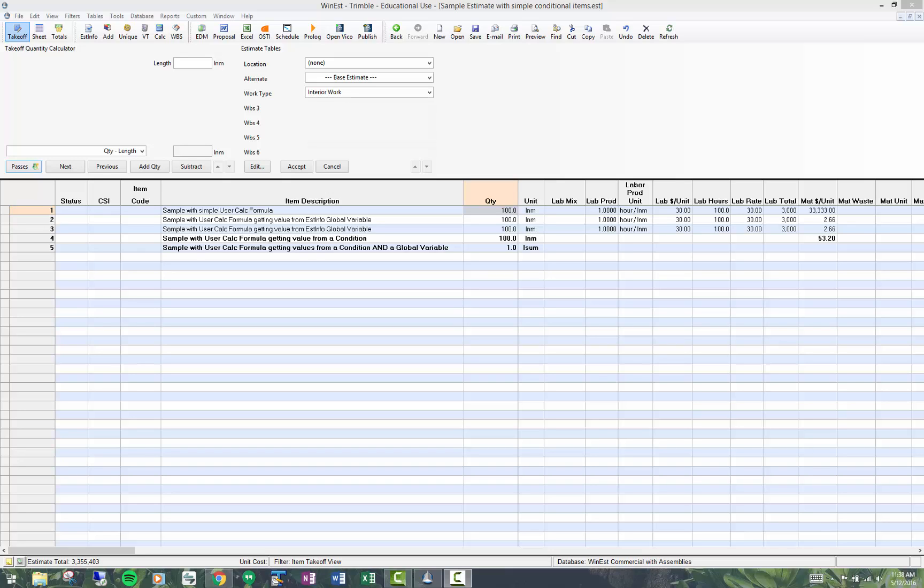This topic is on conditional items. Conditional items in WNESC are items that calculate values based on another item or items in an estimate, hence the term condition. I like to think of them more as dynamic items. In this example, we're going to show you a conditional item that gets a value from the work breakdown structure value.